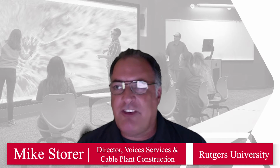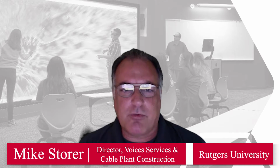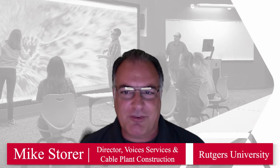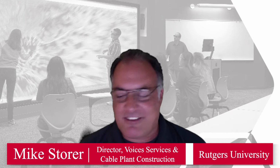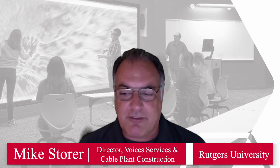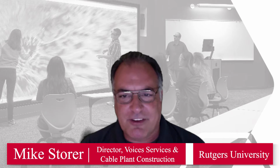Absolutely, we do. We're seeing a lot of changes with regard to the amount of cable going into buildings now. So while people sometimes get the idea that they're going to reduce the cable budget for the building, it's really just that we're shifting the cabling over to Internet of Things devices, and we just need to make sure we account for rack space and that we get that stuff in the walls in the right place so we don't end up cutting holes in our brand new beautiful buildings.